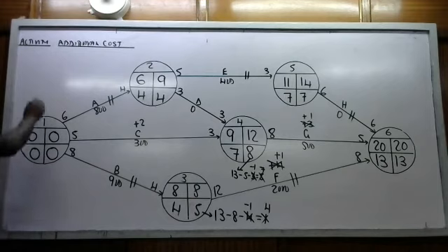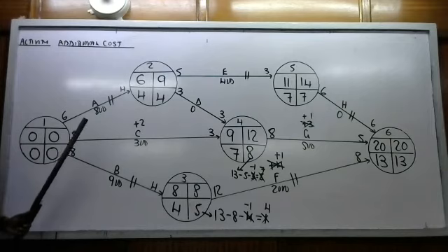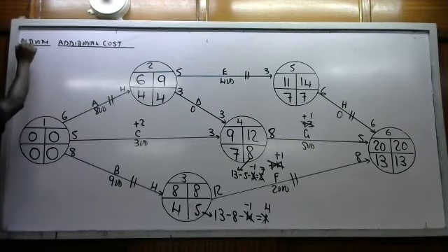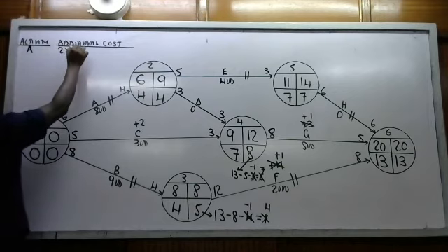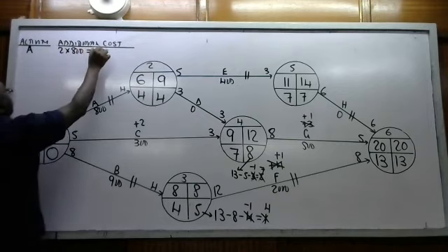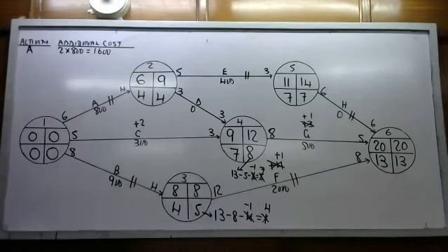So we argue this way. Activity A, we have reduced it by 2 days and we were not able to return it. So that one is attracting extra cost. A, 2 days each at 800. That gives us 1,600.